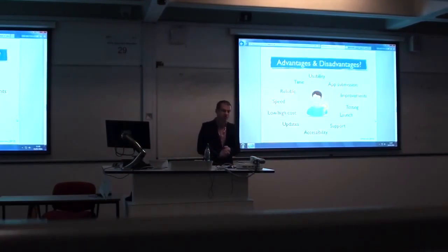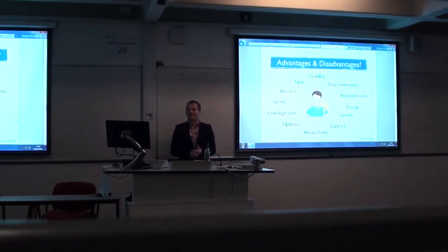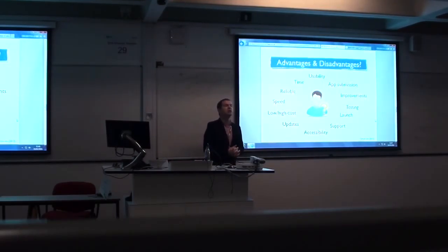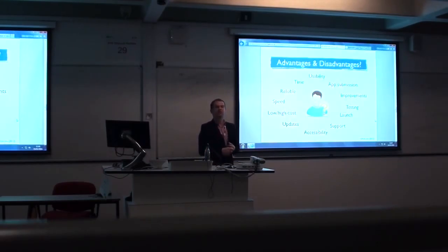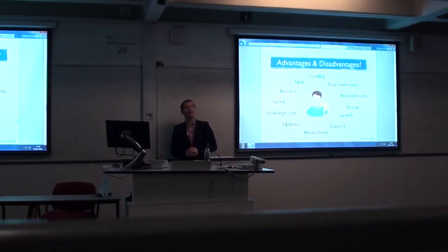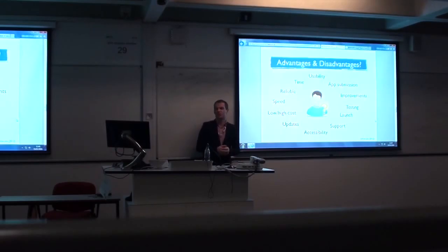So if those guys are reliable and they tend to do the work on time, then you're lucky. But they might just take on too much work, which happens a lot, and I've used some of these services. And again, it's not that they're not good enough, they just do not have time, and there are 2 or 3 people working on like 10, 15 projects that they accepted, but they're not really ready to deliver all of them, right? So there will be a delay on almost every project.